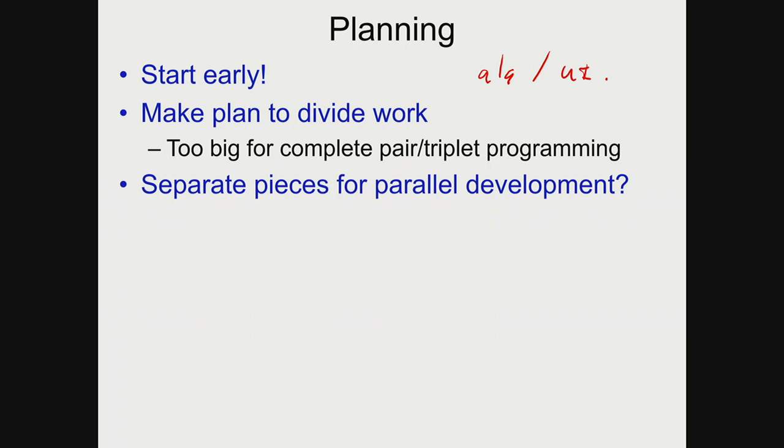And maybe we'll find a few more, make a longer path, and we can just set up a vector that stores that, because that is how we encode our path. That's what our algorithm's going to return. Once we do that, the person writing the UI to display a path can just use that. So they're hooked up to one hard-coded path. After they've shown that one really well, maybe they make another hard-coded path, but you've broken a dependency. So yeah, it's the right way to do it.